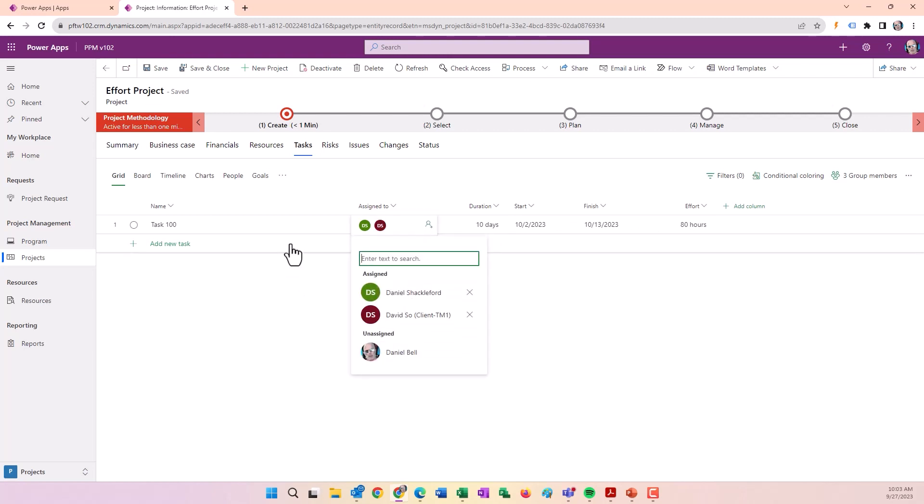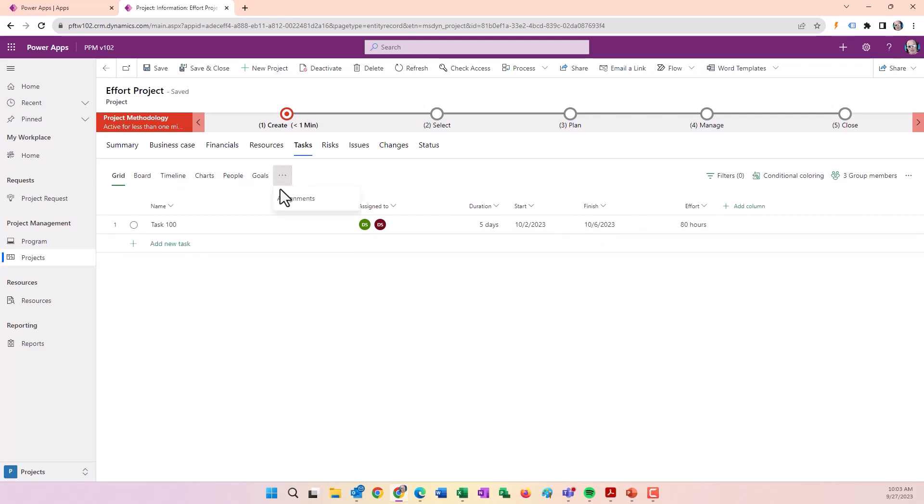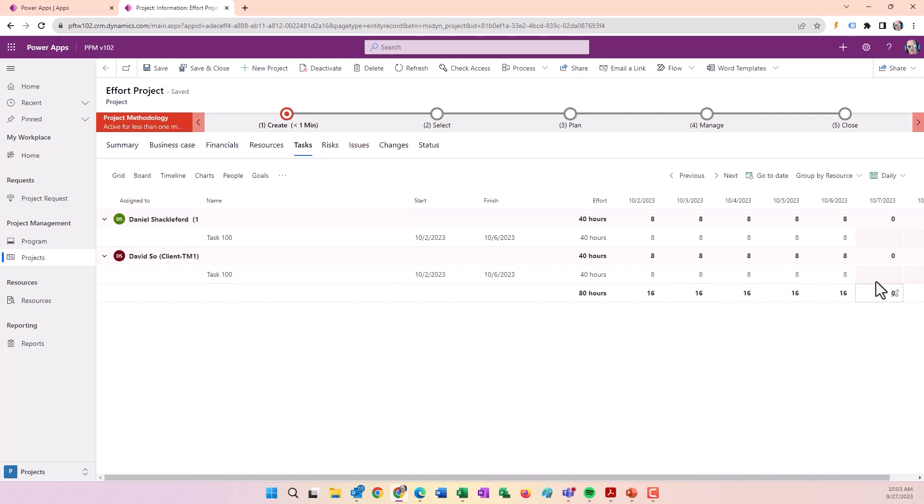If we add another resource, the effort stays the same but duration goes down to five days. It's finished in half the time because two resources can complete the same amount of work in half the time. Task 100 shows Dan and David, each at eight hours for five days.